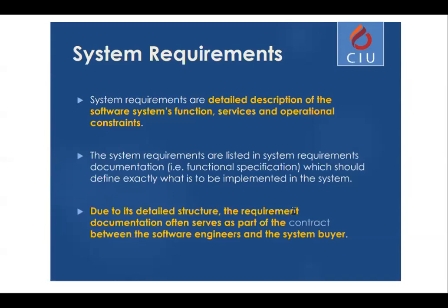Due to its detailed structure, the requirement documentation often serves as part of the contract between the software engineer and the system buyer. So basically, once you have divided these requirements, you can put them into a specification folder, which will help you form what the system should do in detail.